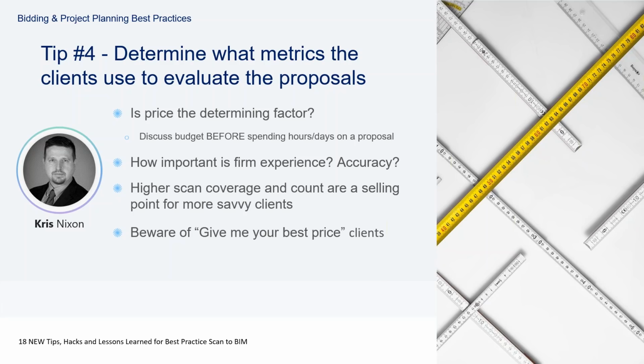So what we try to do, and I would suggest everybody else, is to get the budget discussion earlier in the project proposal, so that you at least have a feel, even if that's a range, of what the client's expectations for spend is going to be, before you spend hours and weeks and site walks and many times flying out somewhere to even look at a site. And it can save you a lot beforehand.